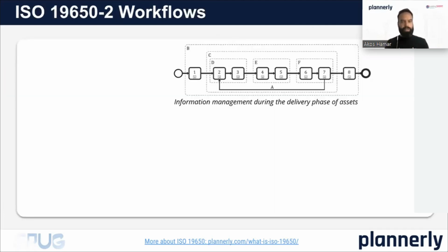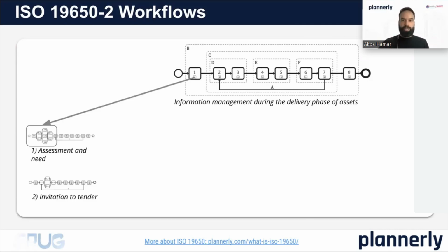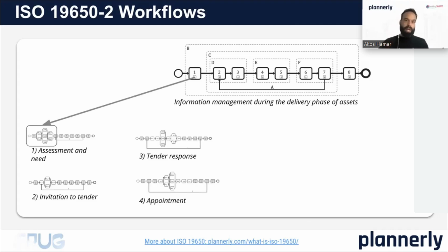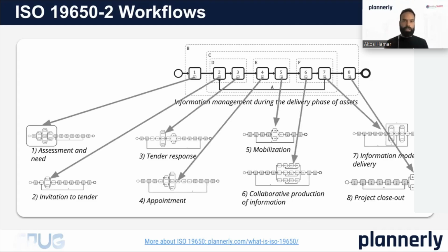It has different parts. First, to talk about the principles and concepts. The second part, which is I think the backbone of it really, and the backbone being this process chart that you see as well. So it really outlines how you go from nothing to delivering the project and learning from that project. This process, as I build the screen, you see it is 8 steps starting from assessment and need, as I mentioned, going all the way to closing the project and learning, take the lessons learned on the project.